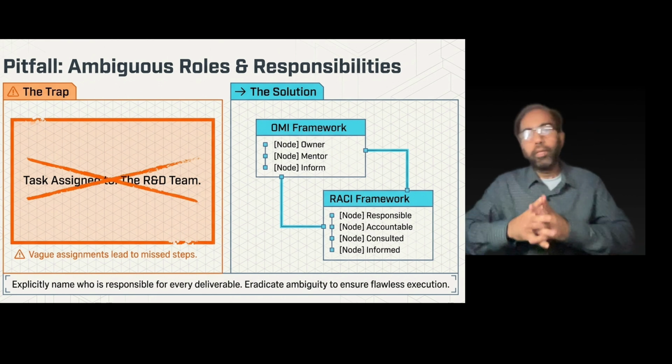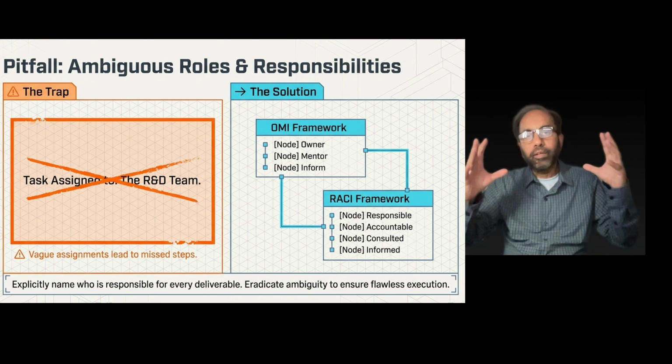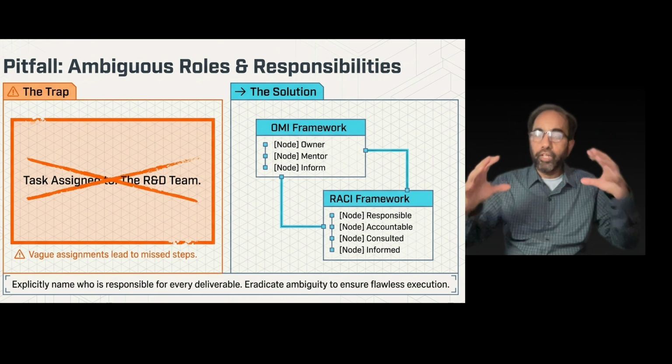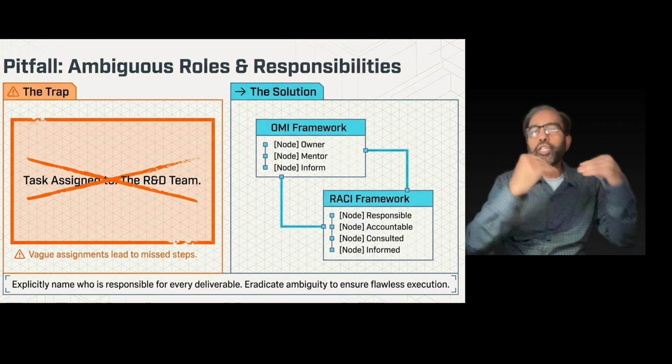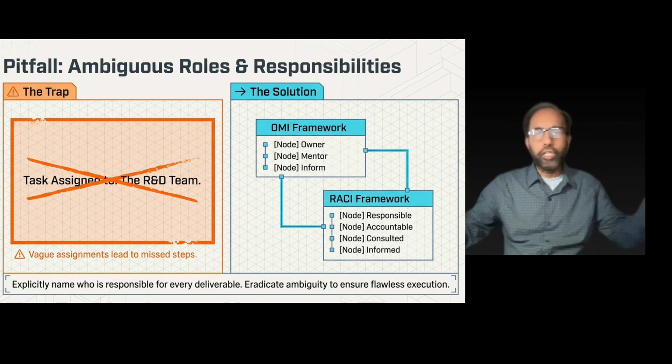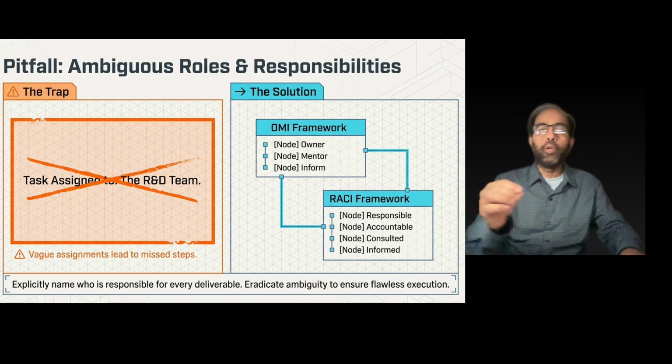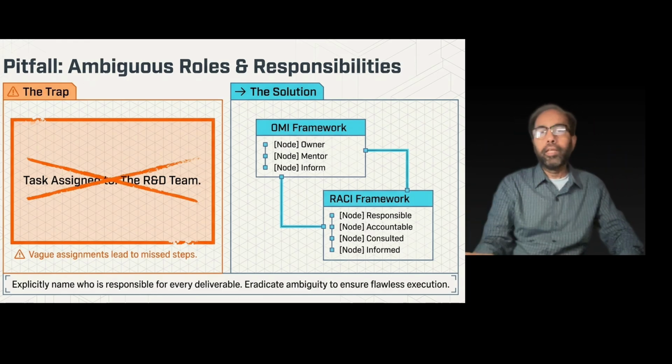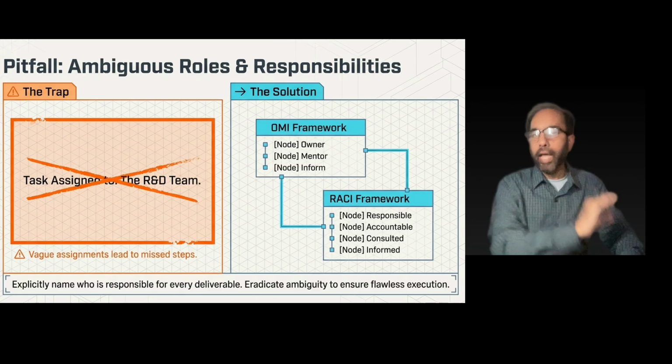A lot of the time, projects are not getting completed and tasks are not being finished because you assign it to a team, and then they're all depending on each other, thinking that somebody will come, somebody will step forward, and somebody will get it done. But no, you want to have the timeline such that there is an ownership for each task.